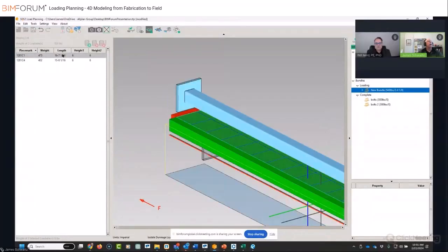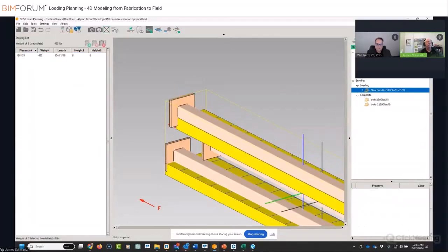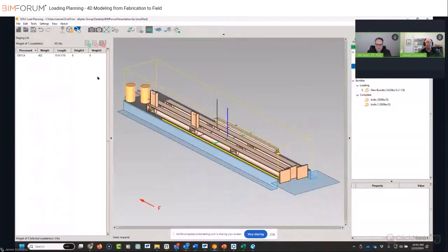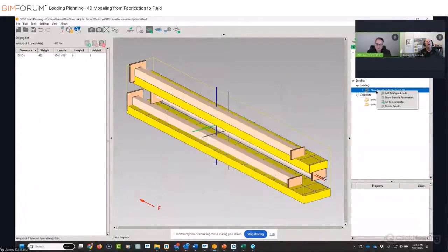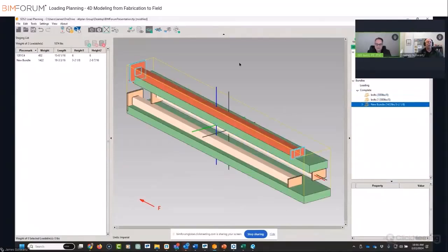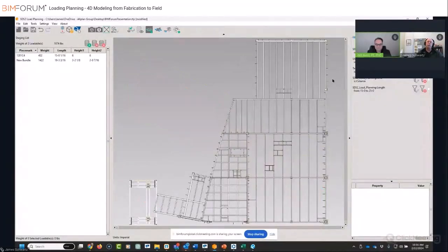But let's go in here and add that on. So again, you're pulling these members from the sequence that we already identified, and this data is going to be updated to the model as to what trailer it's on and if the trailer shipped and when it hasn't. Yep, exactly. And in fact, most of the time they'll use their MRP product. That's why we send this back to them with the trailer load with all the materials, because for the shipping and everything else, the logistics will be done in the MRP. We're just providing that data. I mean, this is simply taking this rich database and using it to enhance everything that you're doing.